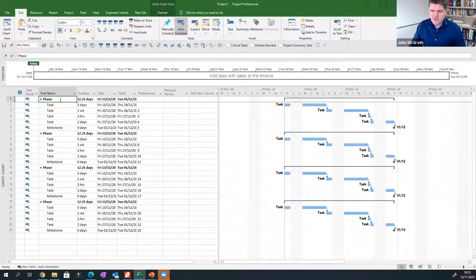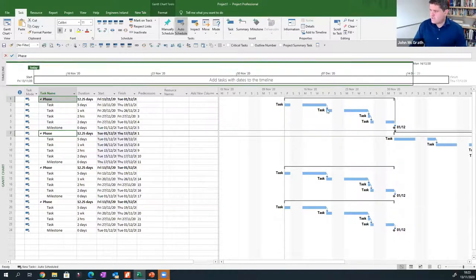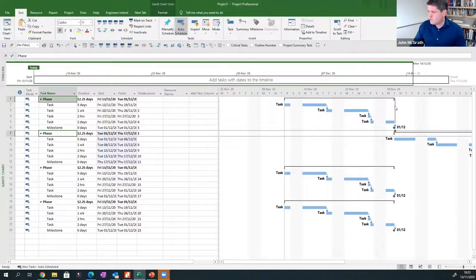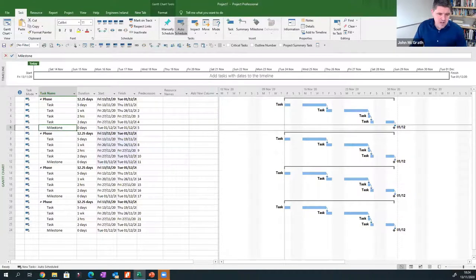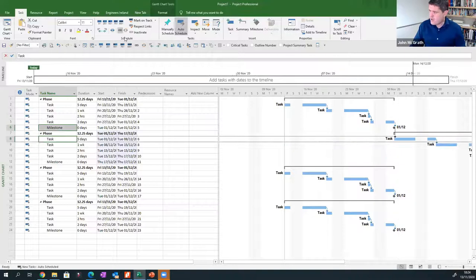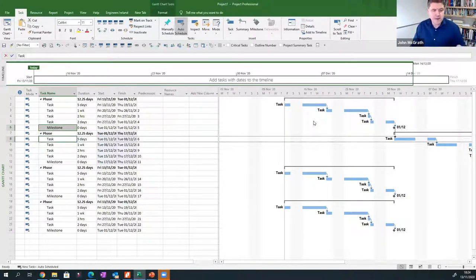The next thing is building links between phases. A lot of official MS Project curriculums tell you to link from phase to phase using the chain link button — the problem is it creates very long, complex lines that disappear down to the abyss. Best practice is actually not to do that. The smarter technique: when you want to link phases, select from the milestone above, hold Ctrl, and select the first activity below. Hit the link button and you get the same impact but a much cleaner, smarter line. If you build a messy Gantt chart in the planning stage, when you load all the information in it gets very messy, so you want a clean, logical, easy-to-follow Gantt to begin with.